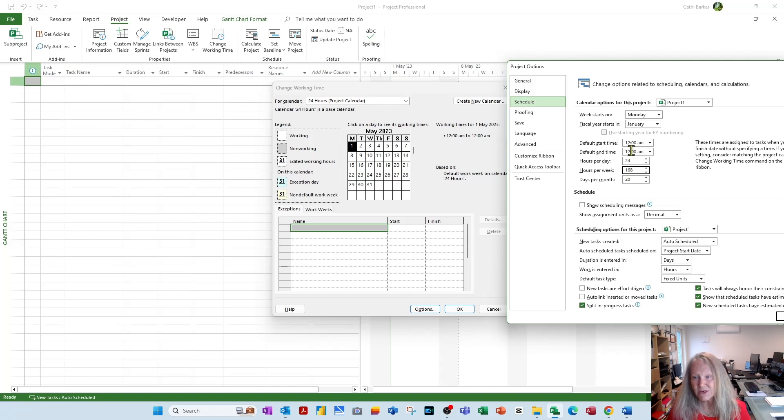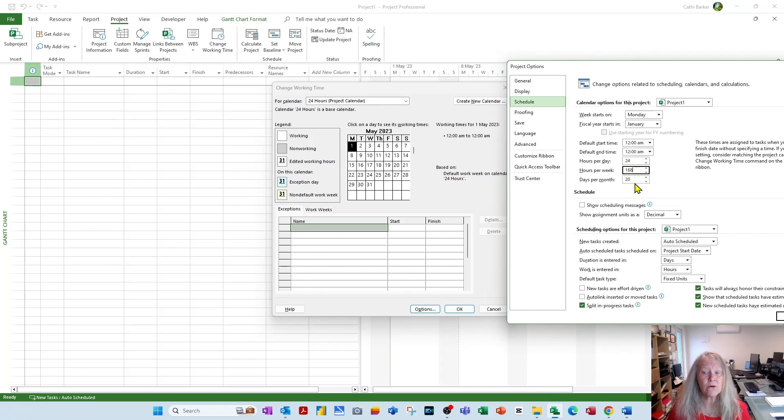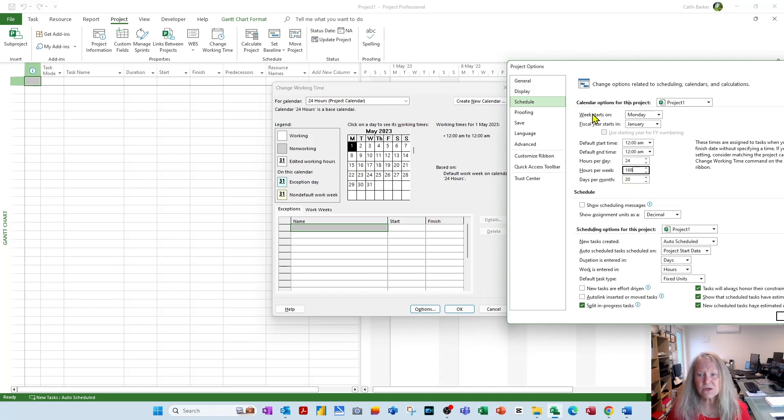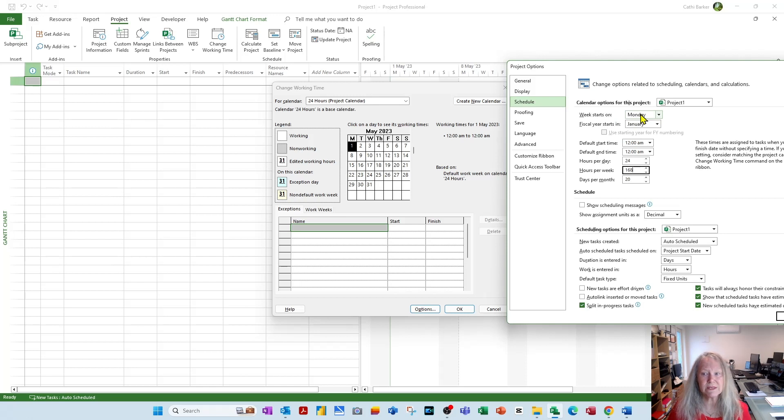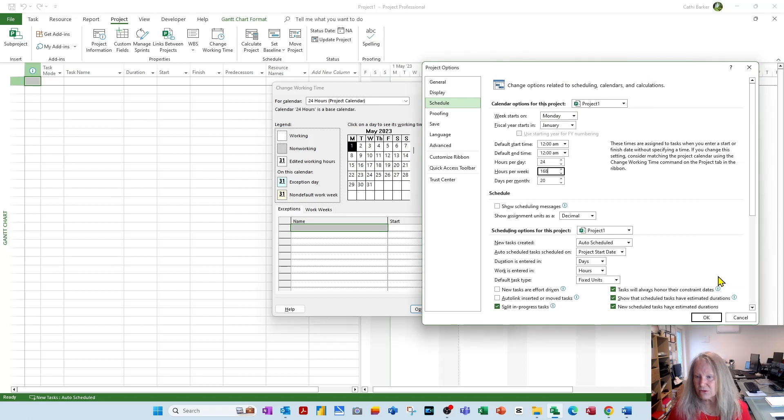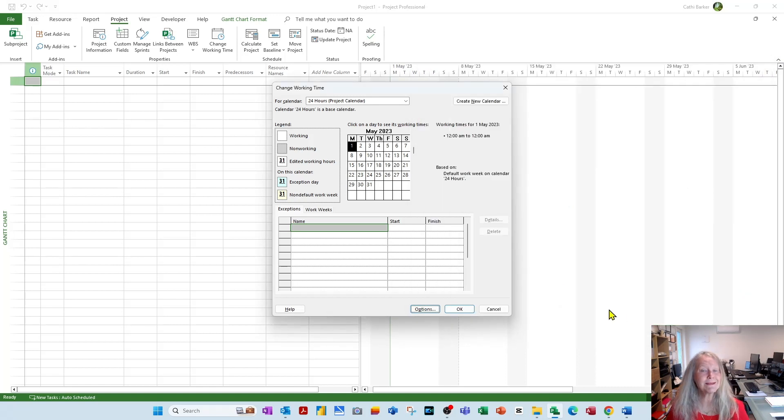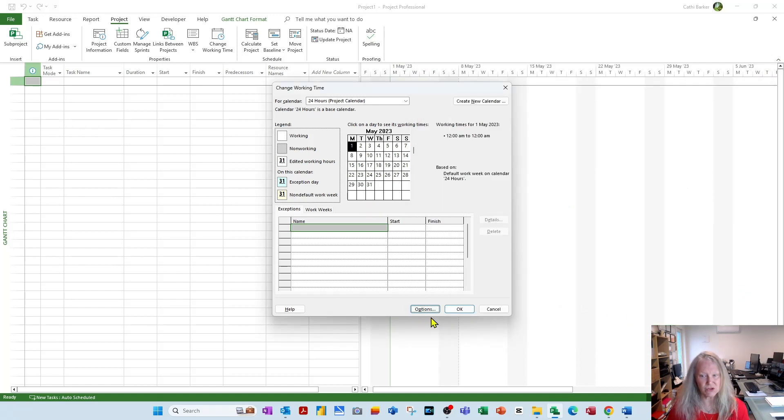Do not worry about the days per month, and sometimes you need to change this to Monday if you want your working week to start on a Monday. I'll bring this back into view, go OK. So you must do that. Check this is 24 hours, check the Options button is correct, and go OK.